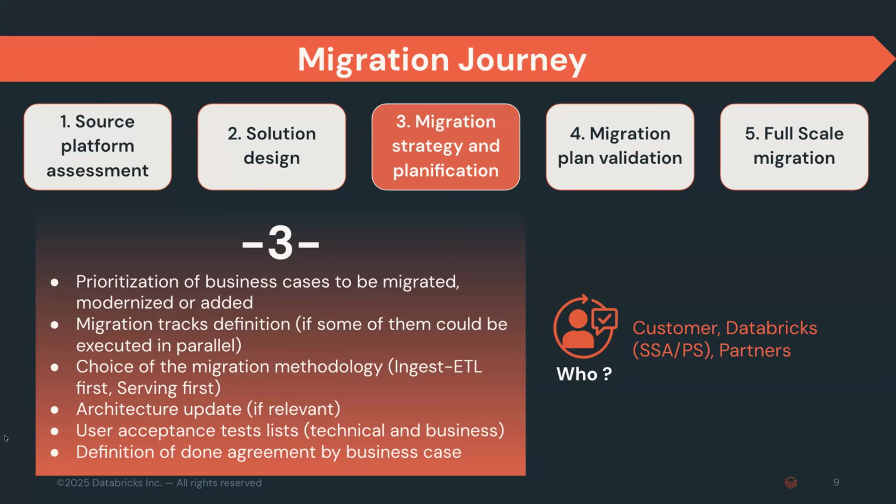And by investment of effort, I mean not development effort, right? But rather subject matter expertise, domain expertise. We really need stakeholders and sponsorship to whom we talk, to whom we can validate, making sure that we also have the time and investment allocated from our customers to perform user acceptance testing, and that they are available for questions and answers, and validation of what we have.